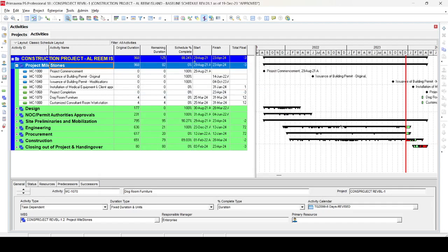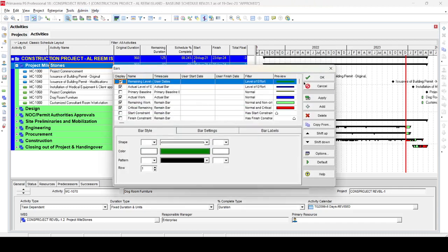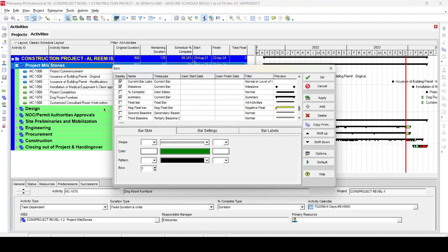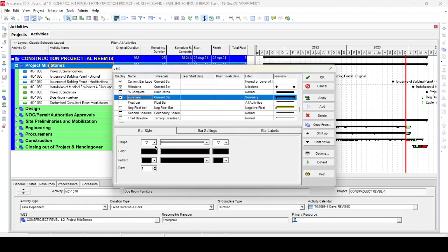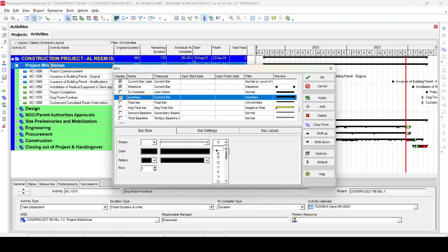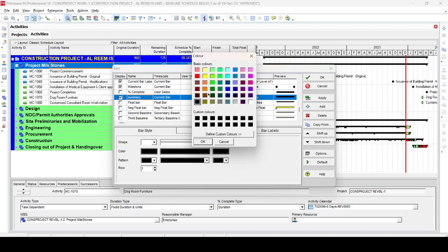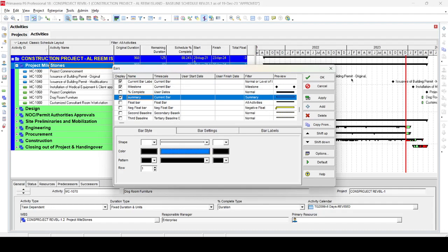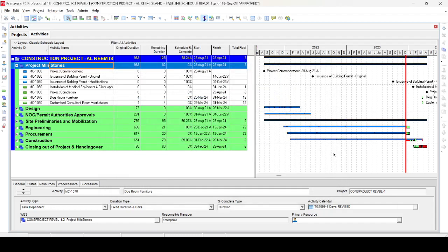Now we want to remove all the intermediate milestones. Go again to the Bar dialog box and select the Summary bar. In the Summary bar settings, find the Start Shape and set it to None. Similarly, set the End Shape to blank or none as well. Then select a color — for example, blue — and press Apply. You can see that there are no more intermediate milestones shown.